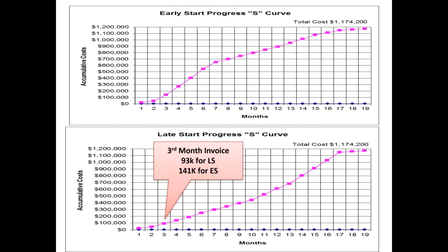So you can see the difference it can make. First thing is that whether you do work on the early start or the late start, the total remains the same. So there is no variation in the total spend. However, the amount of outflow from a client's perspective is a bit front loaded in the earliest timing.